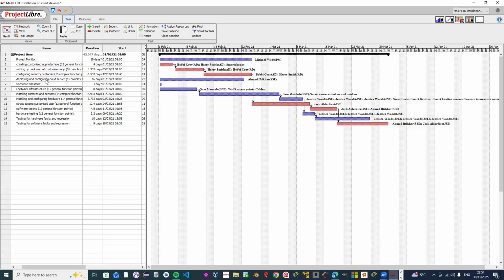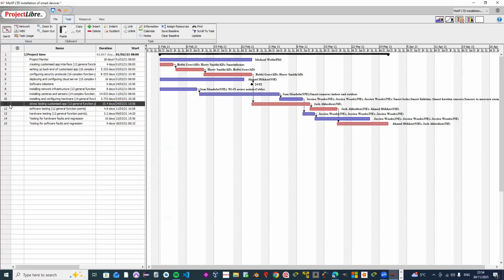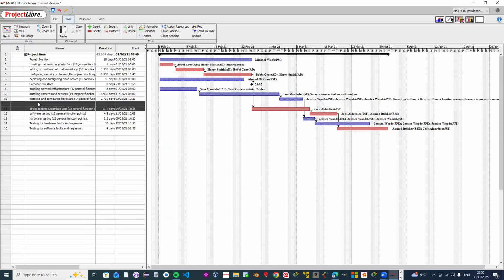All right. Notice you have a day on it. It should be 0. And it should be at the last where the last software is being installed. So I put my milestone right there. And it gives me the 24th of a second. Now I'm going to look for where there's installation going on. And this is where all the installation is. Just basically any phase that is related, like installation of hardware.